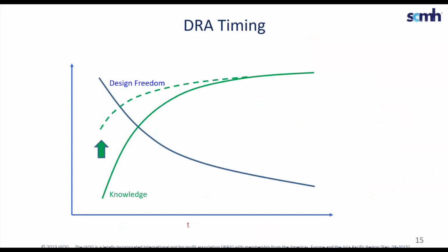However, the DRA is considered a living document and is updated throughout the product lifecycle as any new design changes are introduced. The updated DRA can then be used as a starting point for the next project to ensure that these known design risks are addressed in new projects as lessons learned.